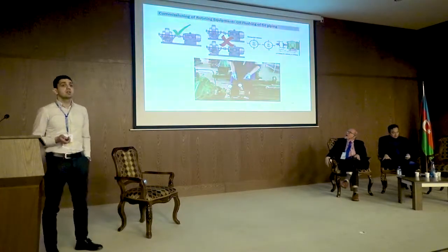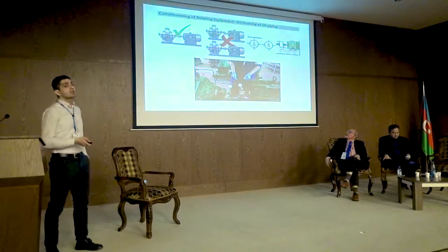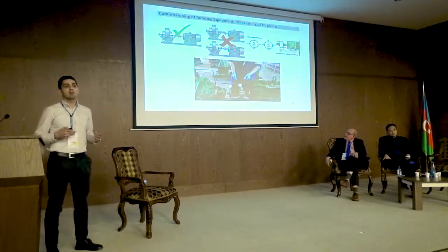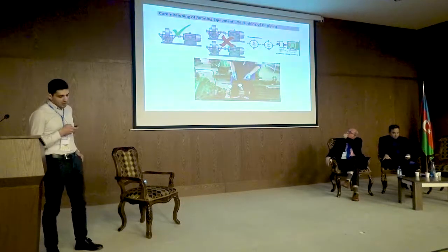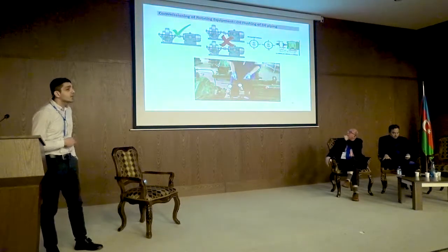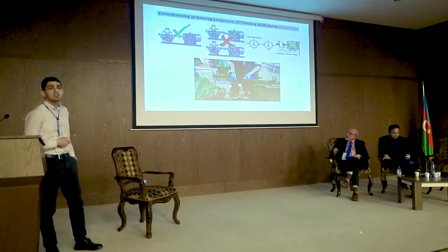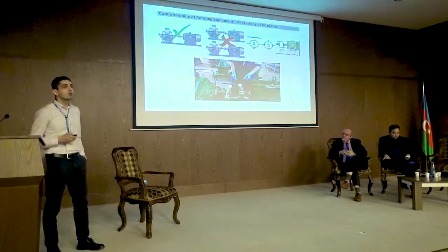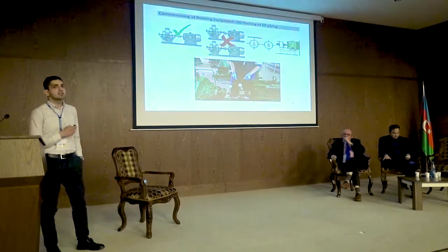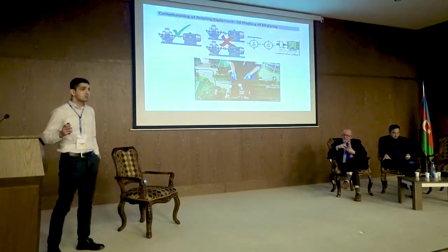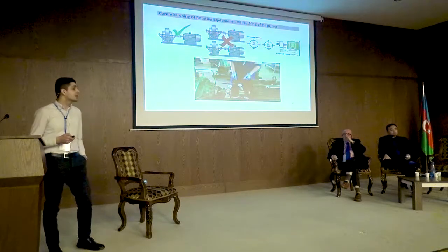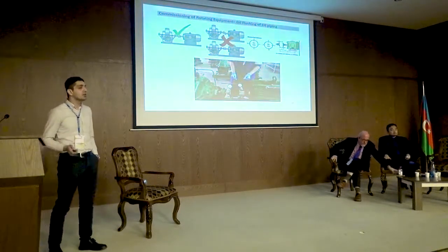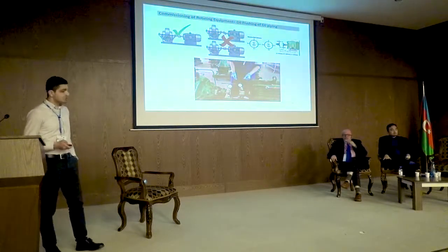Okay. So this is a typical alignment procedure that we are doing. Once we have installed the rotating machinery, the driver and the driven unit, we have to make sure that the driver and the driven unit are well aligned. So for a simple turbine, it can be a one day long procedure. But for a big machine, like a big centrifugal compressor driven by a steam turbine, it could take even months actually to make proper alignment, because we also have some other factors like piping and so on to be taken into account.